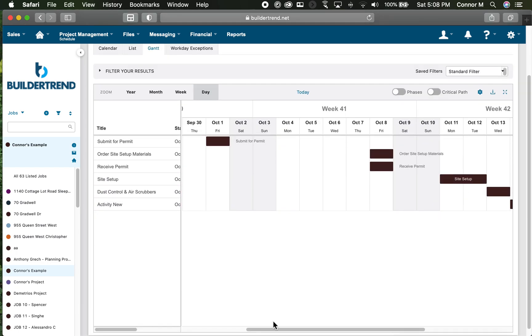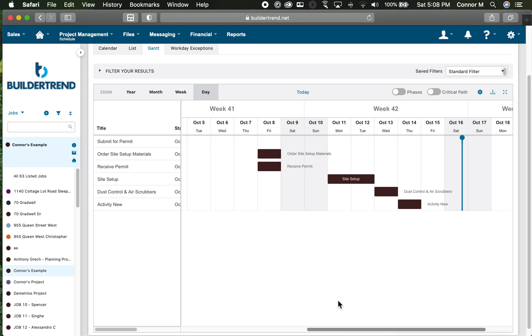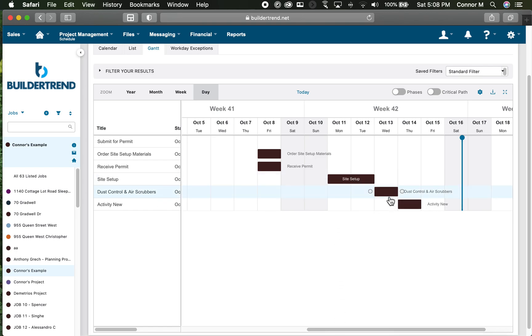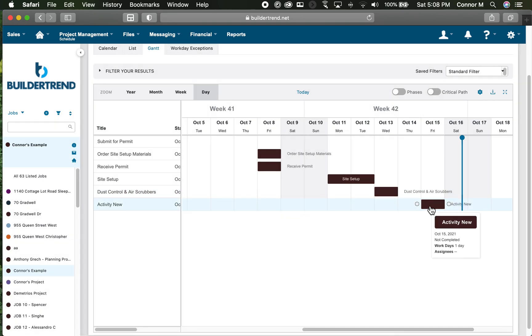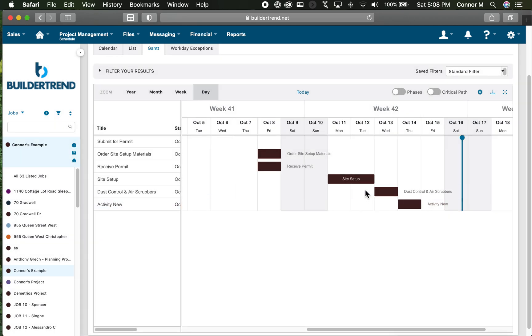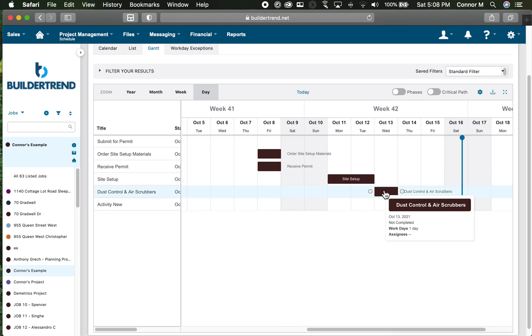I then have determined that my site setup on-site is two days. I have dust control and air scrubber setup and then my new activity. I can drag these into order for how I think they can work. I want to get these roughly into order and have the duration set before I start to add relationships.